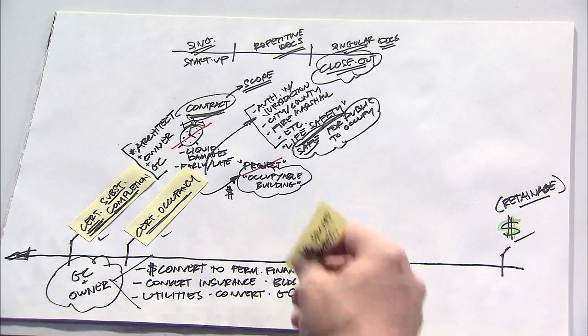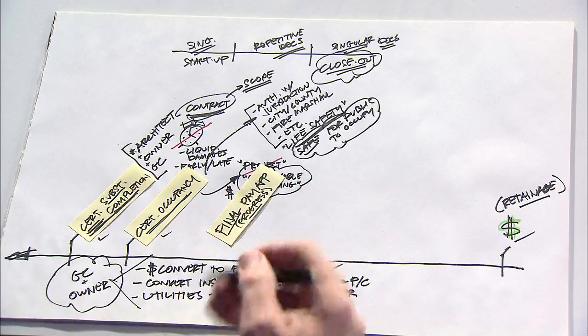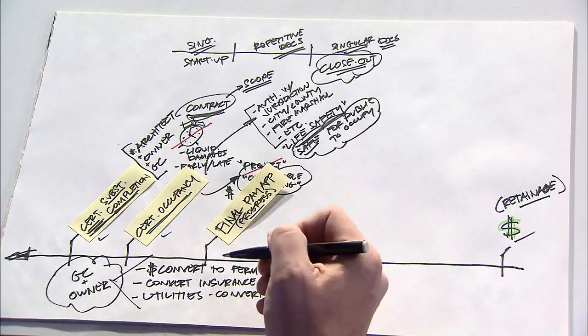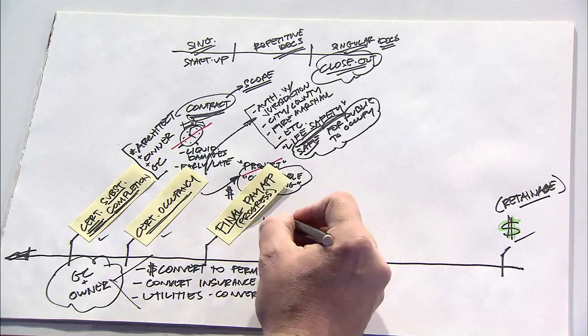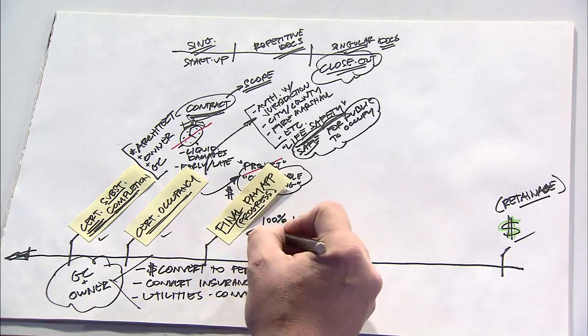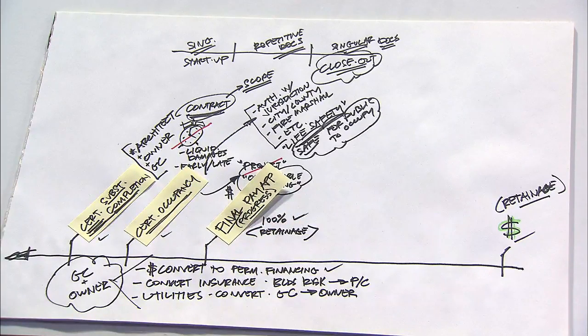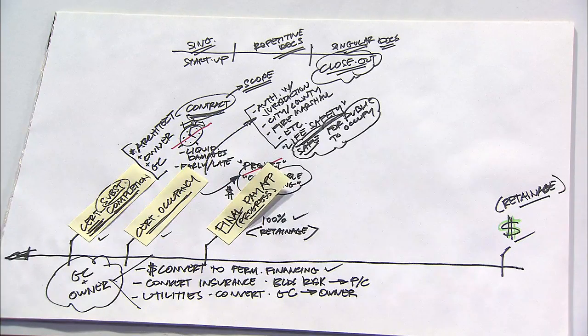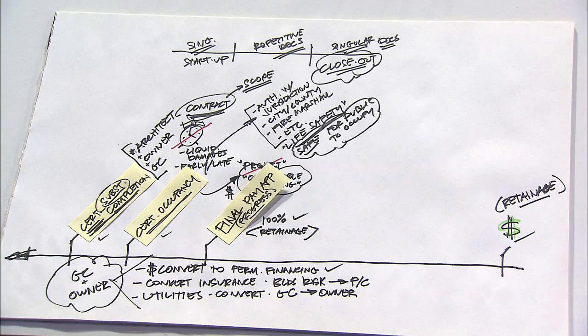Once the Certificate of Substantial Completion is issued, then typically the contractor would be able to bill for the last progress payment. This would be a payment defined as 100% of the project, but still minus the retainage. What this suggests is that everything on the project has been substantially completed, but there remain a few things to do.